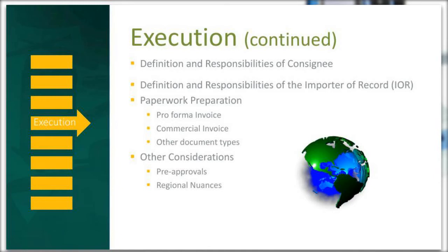However, the role of the IOR varies from country to country. In some, the sponsor is the only entity that can assume the role of an IOR, while in other countries, the IOR can be a third party, such as a clinical research organization or a distributor. That's why it's important to understand the role of an importer in every country to which the clinical studies are shipped.